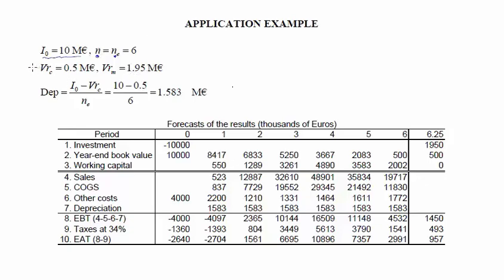We also have two values for the residual value of assets. One is what is known as the accounting residual value. This is decided with the agreement of the tax authorities, and it is used to evaluate the depreciation of assets that we do every year. The market residual value is a prediction of how much we will be able to sell those assets for in the end. So this may be different. The definition of depreciation is presented here with this expression. We subtract from the initial value of assets the final accounting value, and then we divide the result by 6.